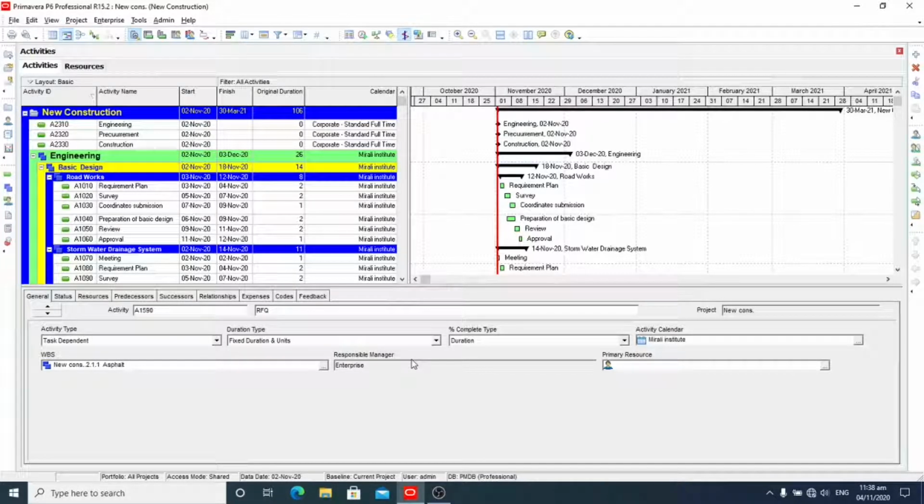The group and sort feature has an abundance of possible options to select for the display of the activity table. It, however, is most common to group by WBS elements. This will show the hierarchy of the WBS and the associated activities all in the activity table. Schedulers may also create and assign unique activity codes and then group the activity table by these activity codes. And as demonstrated, it is possible to group by multiple grouping criteria.